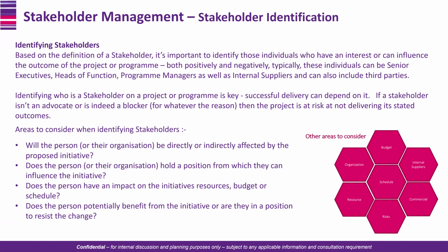So areas to consider when identifying your stakeholders: will the person be directly or indirectly affected by the proposed project or initiative or change? Does this person hold a position from which they can influence the project, initiative, or change? Does the person have an impact on the initiative resources, budget, or schedule? You can see those three key things: the resources, the budget, the schedule, or even the scope of work. Does the person potentially benefit from the initiative, or are they in a position to resist the change?